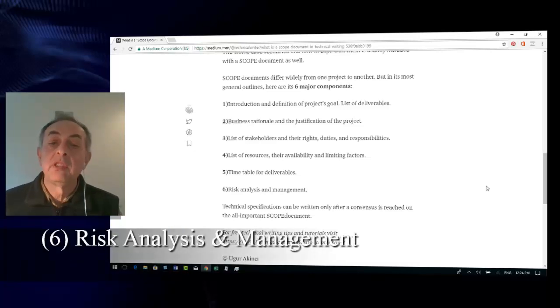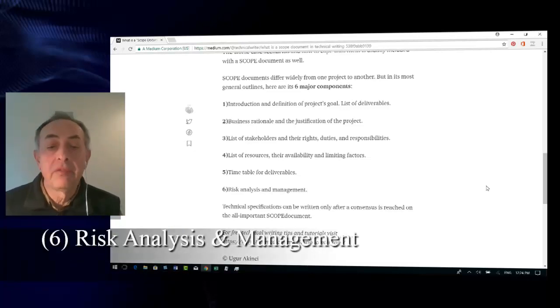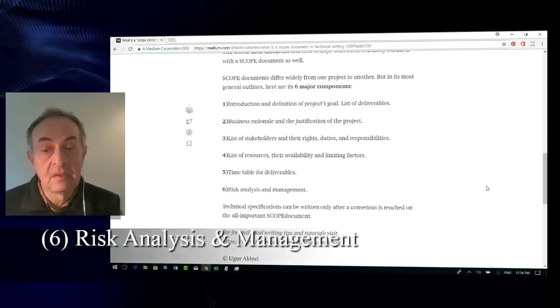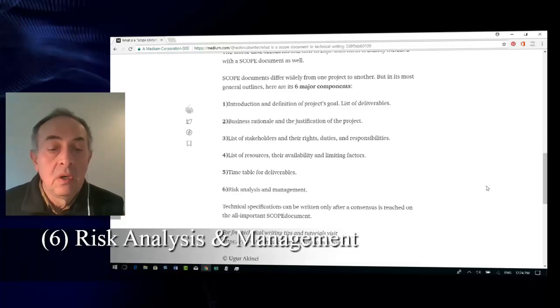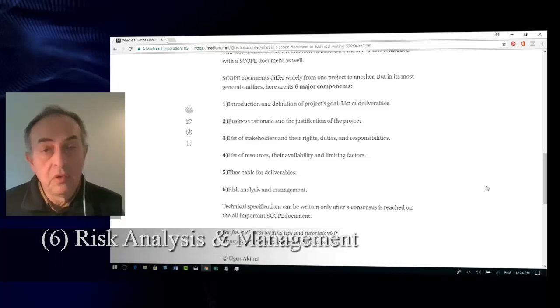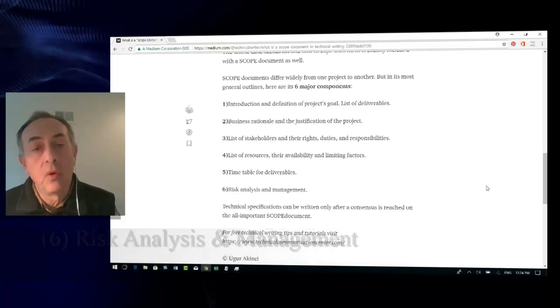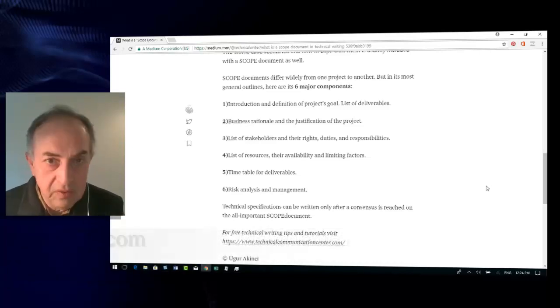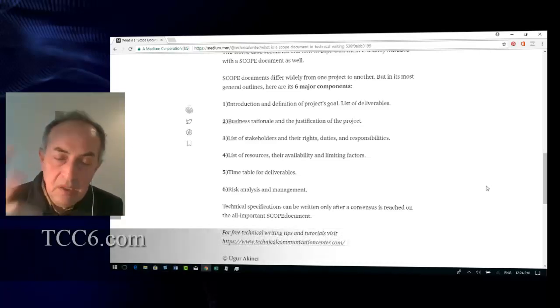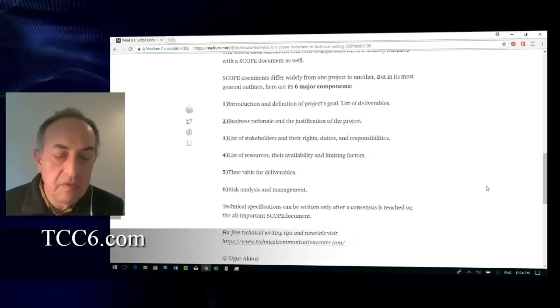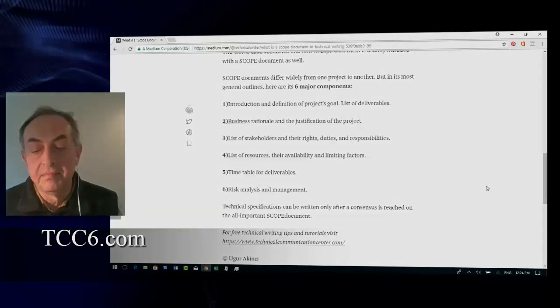Technical specifications can be written only after a consensus is reached on the all-important scope document. See you in the next video. Take good care.